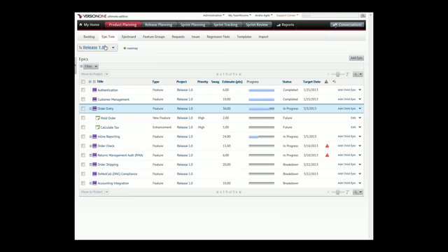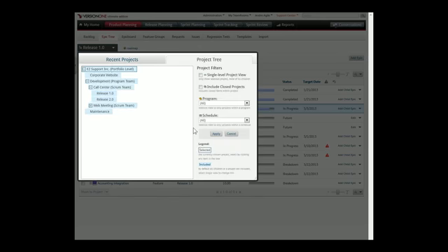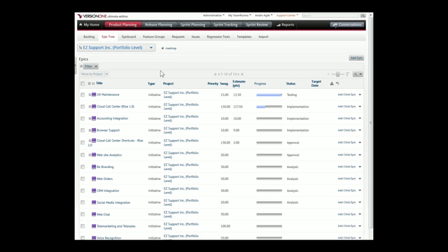Yeah, so I think that's a good point, in that there's a lot of uncertainty in software development. So if you're at the portfolio level and you're putting an initial swag on something like this 150 points, that's the initial budget where the organization says this feels about right. We want to kind of see where we get. If you get into the project and you realize that it's not 150 to get this done, but it's actually 250, then that's an opportunity for the portfolio level team to get together and talk about, given that new information, does this still make sense?